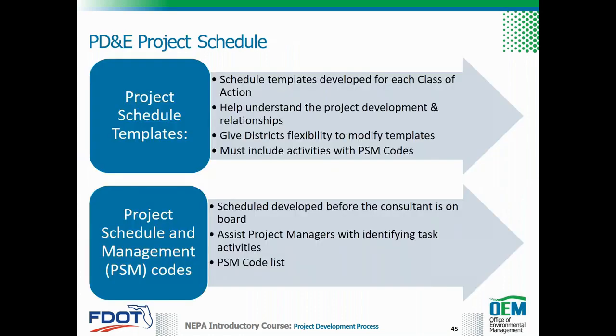To streamline development of PD&E schedules, FDOT has developed project schedule templates for PD&E studies by class of action. The PD&E schedule templates can be accessed from OEM's Project Management PMS codes and schedule template webpage. A link to this site is provided on the resources page. The templates can be customized to meet the complexity and context of the project. The schedule templates provide a task coding structure that uses FDOT's Production Schedule and Management, or PSM, codes.